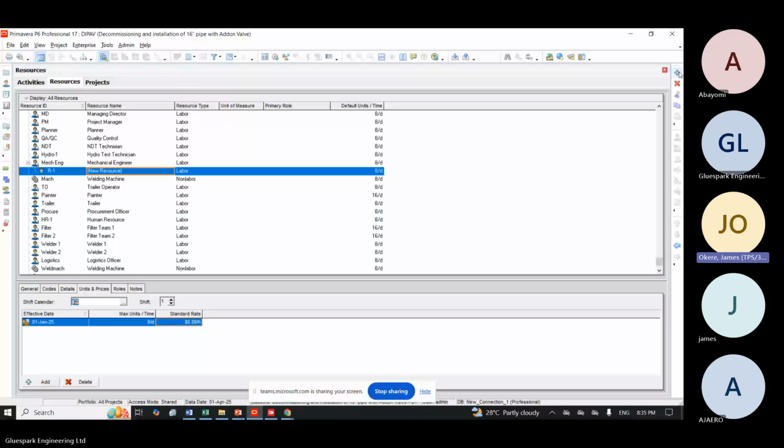So mechanical technicians are the people that we onboard all the flanges. They are also the ones that assist in storing. So I'll just put mech tech. Okay, let me write it in full here. Mechanical technician. So here I will make them 3 persons. 3 persons will be 24, which is 8 times 3. And I'm paying them $10, which is $30 per hour for 3 of them.